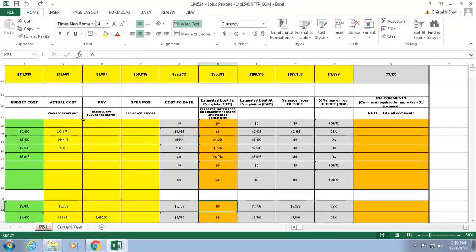So coming back to R&D. R&D is revenue not voucher. So there is a limbo state, for lack of better words, where POs sometimes are received, but they are not vouchered. So, Enrique, you want to expand on that? So vouchered meaning they're not paid yet. AP hasn't paid the invoice. We hadn't received the invoice and AP hasn't paid it. So when they pay it, they create a voucher. So sometimes when things are in that state, it's still received. We have the parts. So it's still value added to our business.